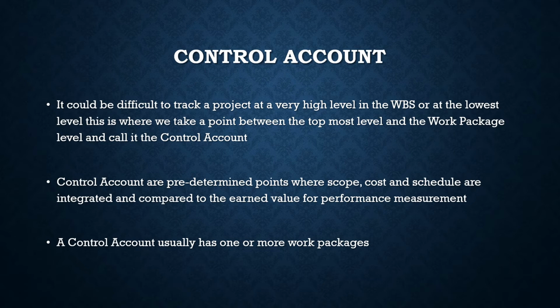But the takeaway from this slide for you should be that control account is a predetermined level. You have decided what level would be control account for your project, and at that level you will measure your progress and compare it with the earned value to understand how your project is performing, right? It can get messy if you track the project from tasks or activities level, or even at the single work package level.